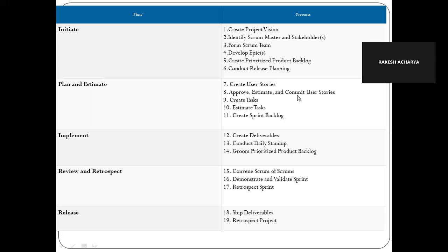Product owner user story means a description of the functionality, the expectation. Login screen, okay, this is a requirement. But in the login screen, I need one login ID, I need the password, forgot password, reset password, and a submit button. Right? These are the requirements, so that we will write as a user story.